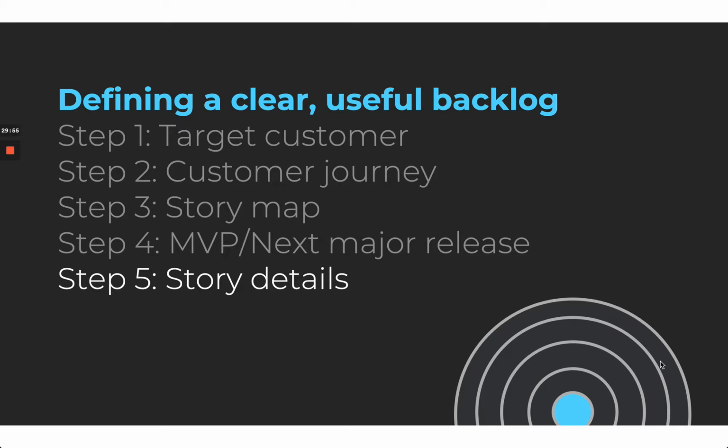Yes, exactly. It's must-haves only, because we have limited time and limited resources, we want to release the MVP as soon as possible. So all the nice-to-haves can wait for later. But all the must-haves must be done through the MVP. So yeah, we only focus on must-have buckets.